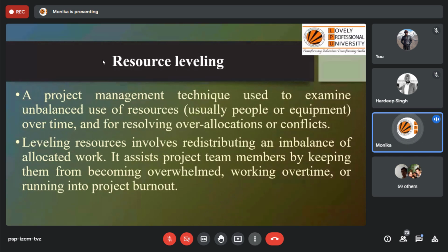Now the problem is your total limit was 50 and you are making an extra allocation, which is not possible. Because your total number is 50 only, there is going to be a red icon which will blink there again and again, showing you there is over allocation in this activity, because you are exceeding the limit you have in your company or organization or as per your resource sheet. So that is the benefit of the software: it automatically lets you know where the problem is. Okay, so we can easily identify that problem in the software and we can balance those resources.